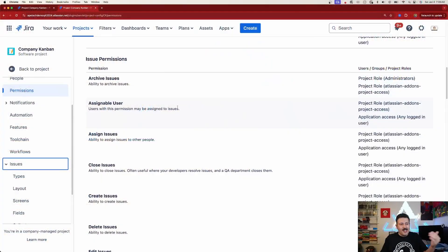Archiving issues is different from moving an issue to Done, and it's different from deleting the issue. When you delete something in Jira — specifically an issue — it's gone forever. When you move an issue to Done, it still counts against your metrics: it counts against your burndown, it's still in your sprint. So you really don't have a clean way of eliminating an issue without deleting it or impacting your metrics. Atlassian has introduced this archive capability where you can go into the issue and just remove it from view — but it's not deleted.